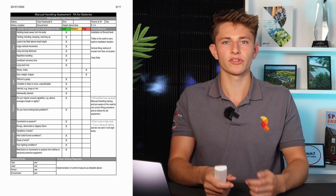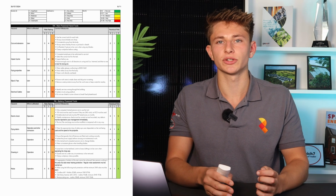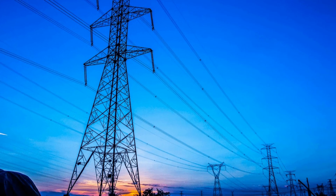It's also the project manager's job to prepare the method statement and job sheet for the project, as well as to prepare the official health and safety risk assessments prior to installation. We take health and safety extremely seriously at Spirit Energy, and the risk assessments and method statements are site-specific to every job. Justin also does a risk assessment on the technical survey and relays all of the information to the project managers to make sure that our installers are safe on the day of the install. An example of something that is relevant for some projects and not others would be checking to see if there are any overhead power lines that come near to the property. If there are any overhead power lines, then they'll need to be sheathed prior to the installation.